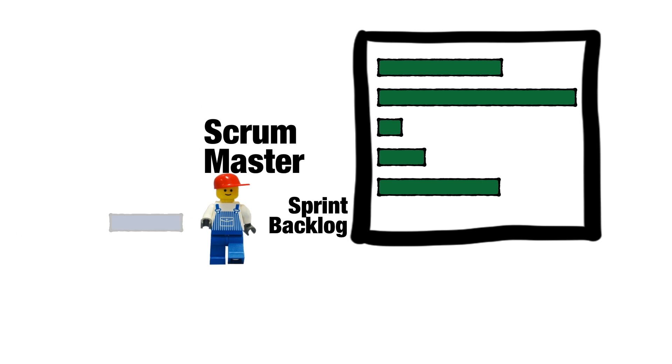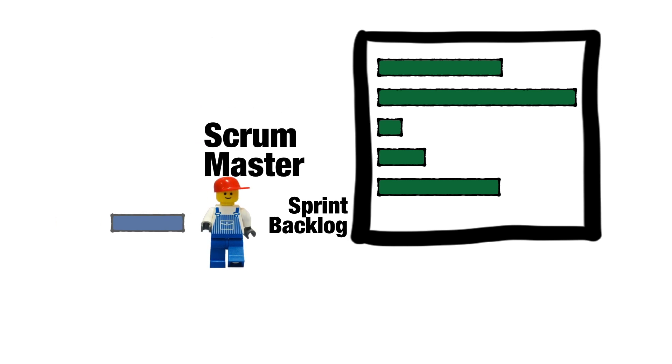Back to the question: can work be added to the Sprint Backlog during the course of the Sprint? Well, the answer is no — and it's yes. The Sprint Backlog is Scrum's way of limiting work in progress, and limiting work in progress is important for getting things done quickly with a minimum of context switching. So when Sprint Planning is over, the Sprint Backlog is locked down. Any attempt by anyone outside the development team to add new work into the Sprint Backlog should be vigorously resisted. In fact, it's one of the Scrum Master's key roles to protect the Sprint Backlog from external influence.